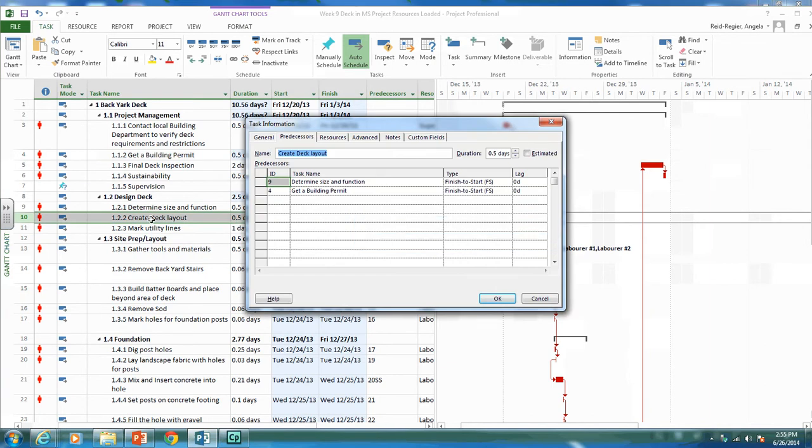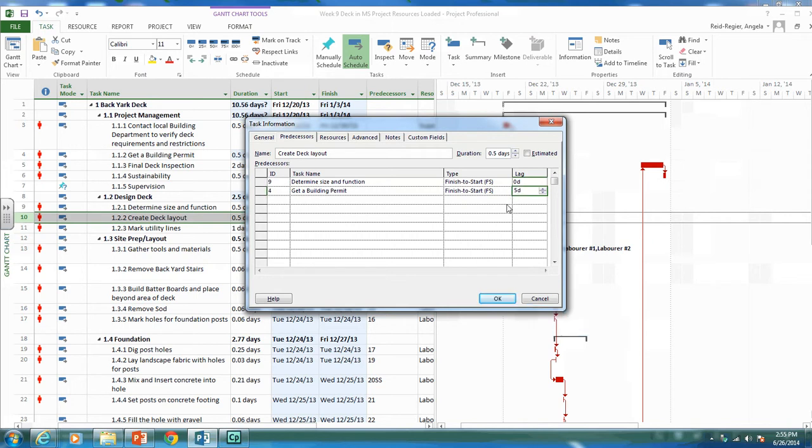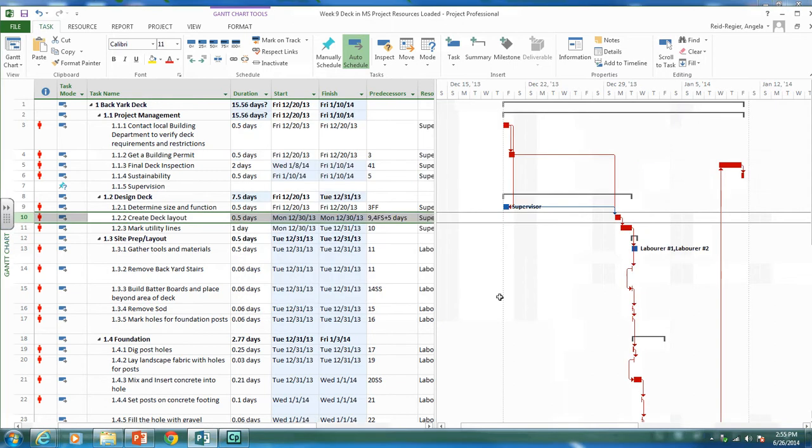As you can see, it has a predecessor of getting a building permit. We have it as a finish to start activity. Let's put a five day lag in here to represent the time we'll wait to get our building permit. So you can see we have the lag. There's our building permit and then there's a five day lag to wait before we can start laying out our deck.